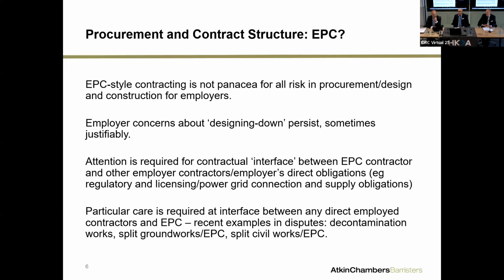So EPC, a lot of people, certainly of my vintage, would say, well, EPC, that's the answer. You hand the whole thing over to the contractor, say this is what I want, define your outturn performance requirements, and wait until the end of the day, pay the bills. What you'll get is what you bought. And I don't think that is a panacea for WTE plants in particular. I don't think it is appropriate to try and pass all risk in procurement and design onto the contractor. Clearly, one of the big complaints about EPC contracting is always the employer's concern about designing down and not getting what you're paying for, and sometimes that's justifiable.